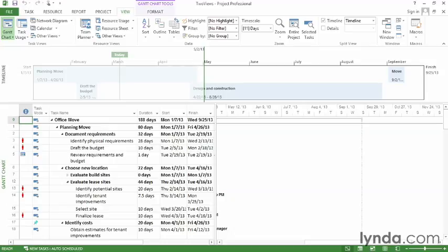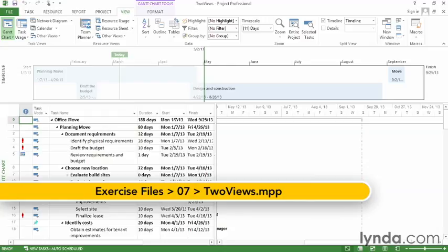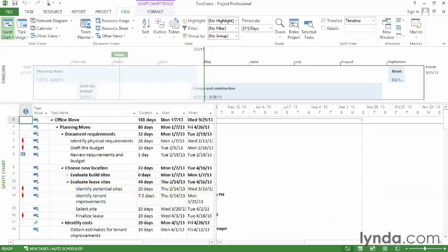When you build your task list, a single Gantt chart view might be best. But most of the time, you want to see the entire project as well as specific details for a task, resource, or assignment. The Details pane displays a second view in the bottom half of the project window, so you can see detail about the tasks or resources you select in the top pane.